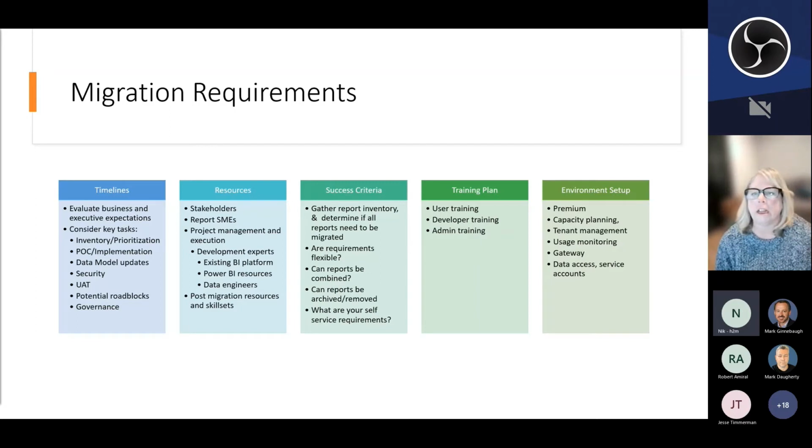Don't do it right away, right? Users do best when they're trained and immediately using a tool. So try to plan for that training. If you start fitting in your timelines, you start thinking, well, we're going to start delivering some of this. We'll put that group in here because they'll start getting their reports around this time. So try to start thinking about how you coordinate that training effort to make sure users aren't trained, and then 6 months later, after we've gotten through our problems or situations, they're looking at it and thinking, I don't remember any of that training. So there's some great stuff out there. Microsoft has got some great stuff, just even poking around online. You've got Dashboard in a Day that a lot, we're able to deliver.